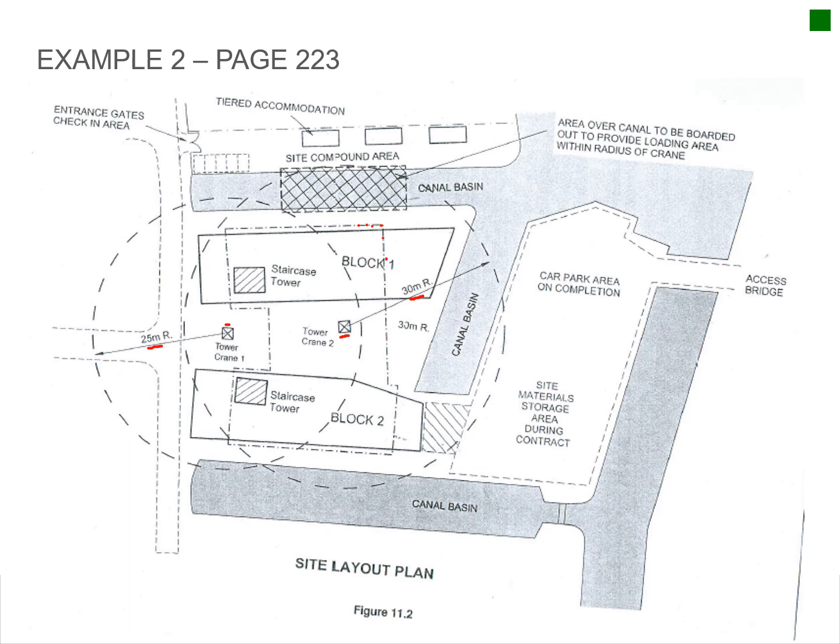So you will have at one stage where you close, we've done everything around the crane, and then you need to take down that crane and then fill that section up later on. Once you're out of the ground, you can actually take that one out and only leave the one.